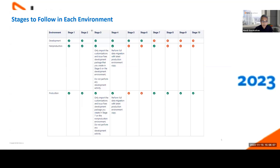Stage four is data migration: you'll practice once in dev, then migrate data in non-prod and production environments, bringing in newer data each time. Stage five is unit testing; stage six is delta migration, which you'll practice in the development environment. Stage seven is UAT, performed in non-production environments like QA, SIT, and pre-prod, and also in production. After stage seven, focus only on production to continue your UAT cycle, sign off, run final data migrations, cumulative cutover, and go live.